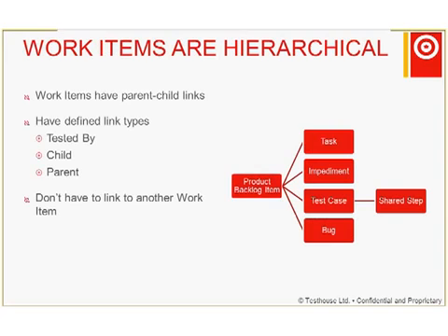So the work items within our product backlog, when we start, they tend to be high-level requirements for work to be done further down the process, and as the project progresses, those work items are refined to give more detail until they become individual tasks that are sensible to be implemented within a Scrum sprint.